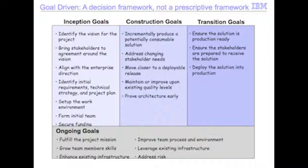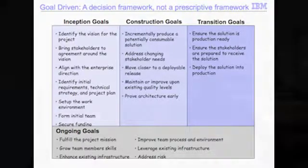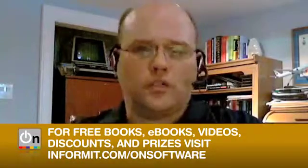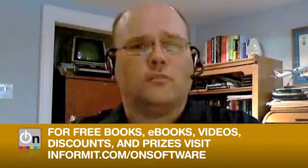Similarly, there are common goals throughout construction. We should incrementally produce a potentially consumable solution, and we should address our changing stakeholder needs. At the end of the life cycle, when we're transitioning our solution into production, we have to deploy the solution, ensure that it's production ready, that the operations and support people can actually take it on, and that it's going to work while it's in production — we might have to rerun our regression test suite. So there are these common goals throughout the life cycle, and our approach should be flexible.